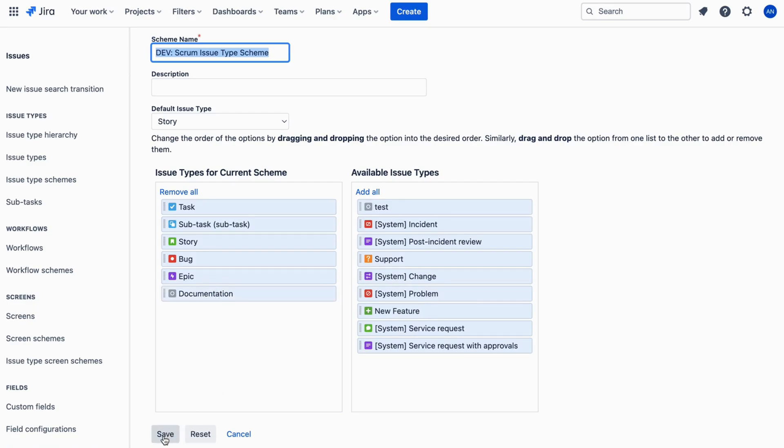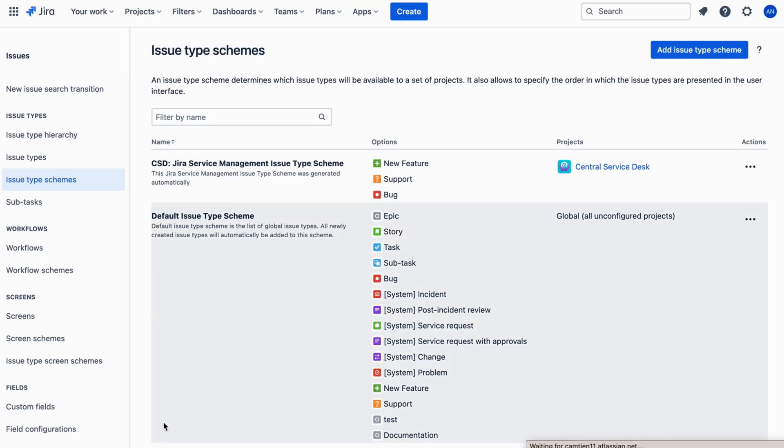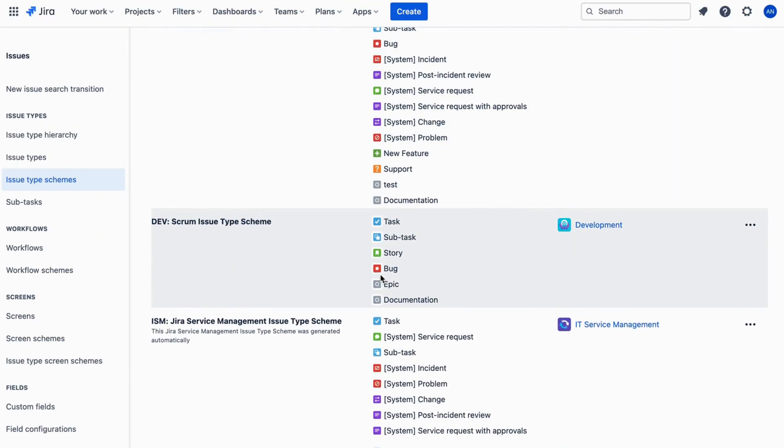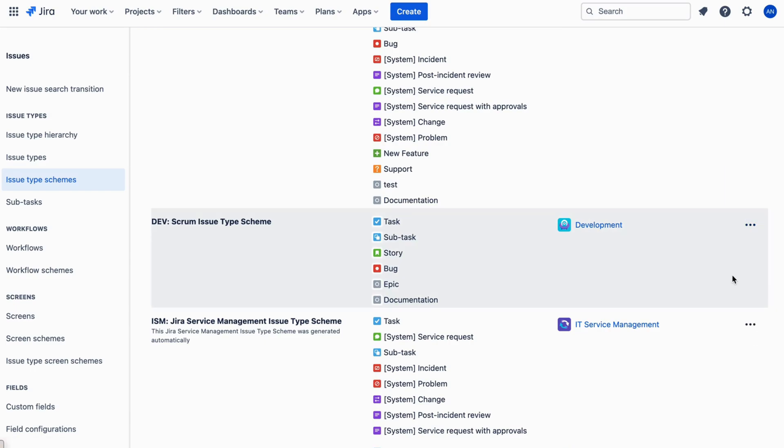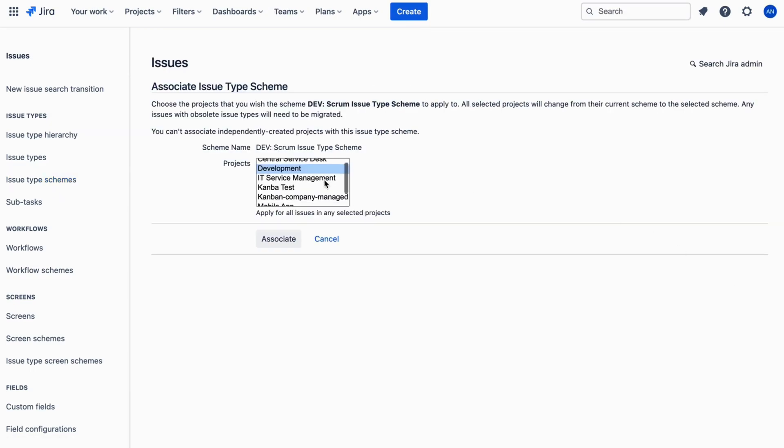If the issue type isn't associated with your project, you need to associate it. Click on the three dots in the Actions column. Choose Associate. Choose your project. Click Associate.